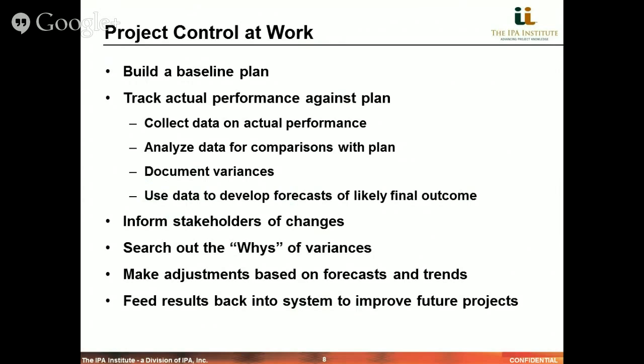And once you've made those adjustments based on forecasts and trends, based on what's possible and what are your business priorities, you may accelerate procurement if the schedule is a concern, but recognizing the cost impact of that. And then finally, feeding the results of this back into your system to improve future projects. So at the conclusion of a project, one of the most important steps that we'll highlight later is to feed the actual cost and schedule results back into your project system so that you are able to improve your future projects, estimating, planning, and scheduling.